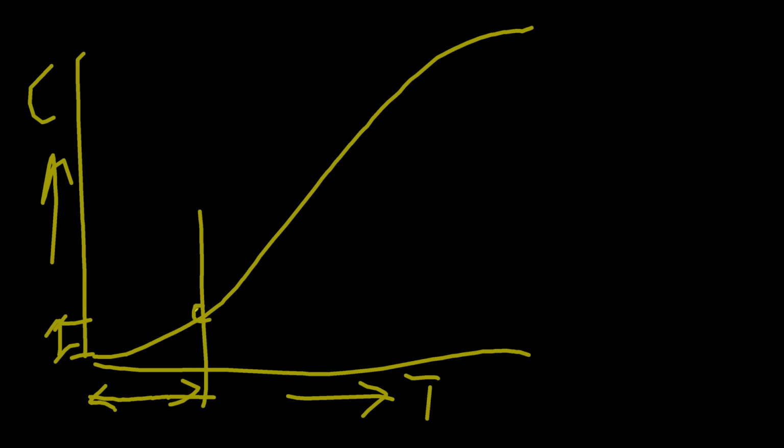It is representing that much work for which a specific budget which is represented by this PV point. Whatever is the value of this PV point, maybe it is 4,000 rupees. 4,000 rupees worth of work should have been done by say 1 month period. At the point of 1 month completion, you should have completed 4,000 worth of job.